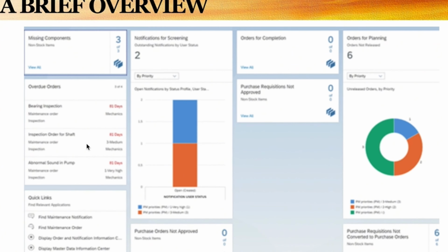Looking at the traditional method that we normally do, where we have to move these work orders to Excel, to know how many days it is due, you'd obviously have to do a little bit of maths, right? Or if you're moving to Excel, you might create a formula on the Excel field, which we even used to do. So we would put a formula, maybe basic finish date minus the basic start, just to get how many days it is overdue.